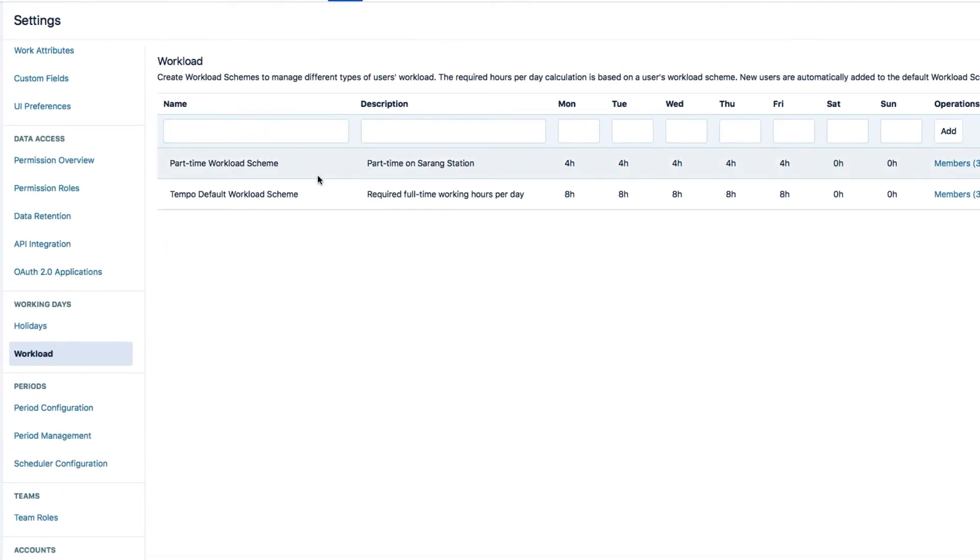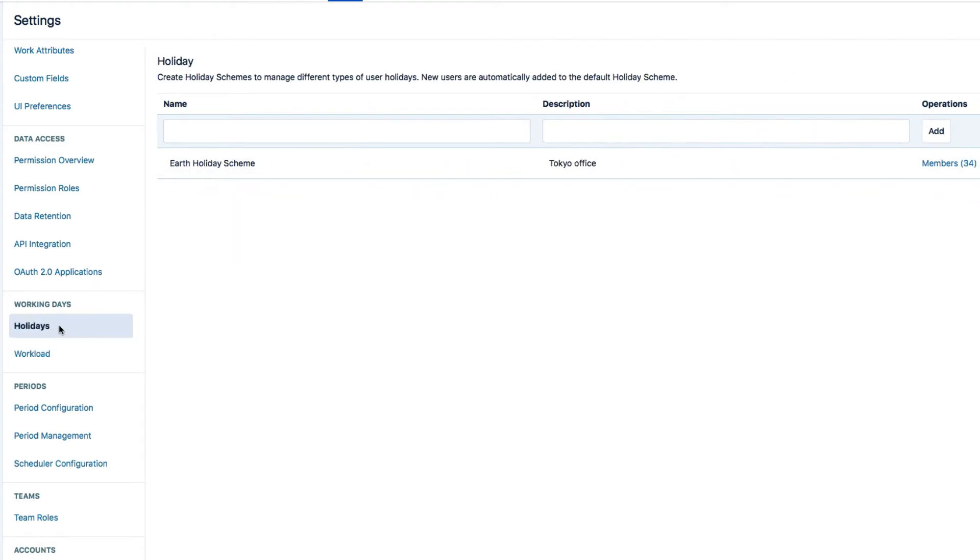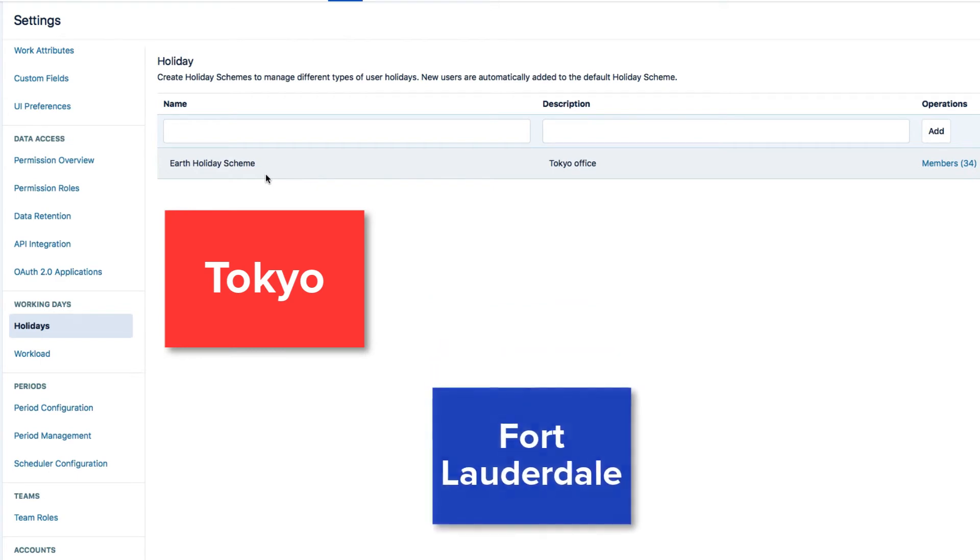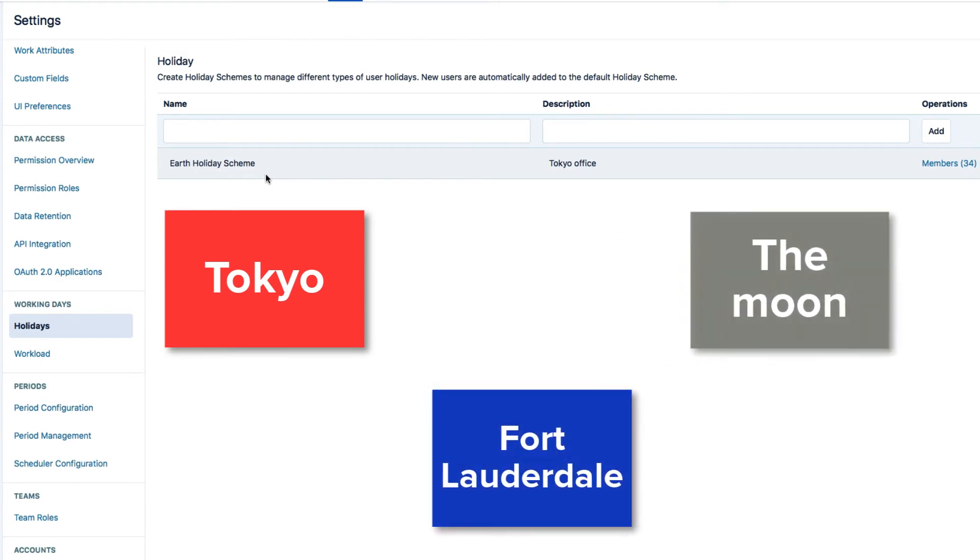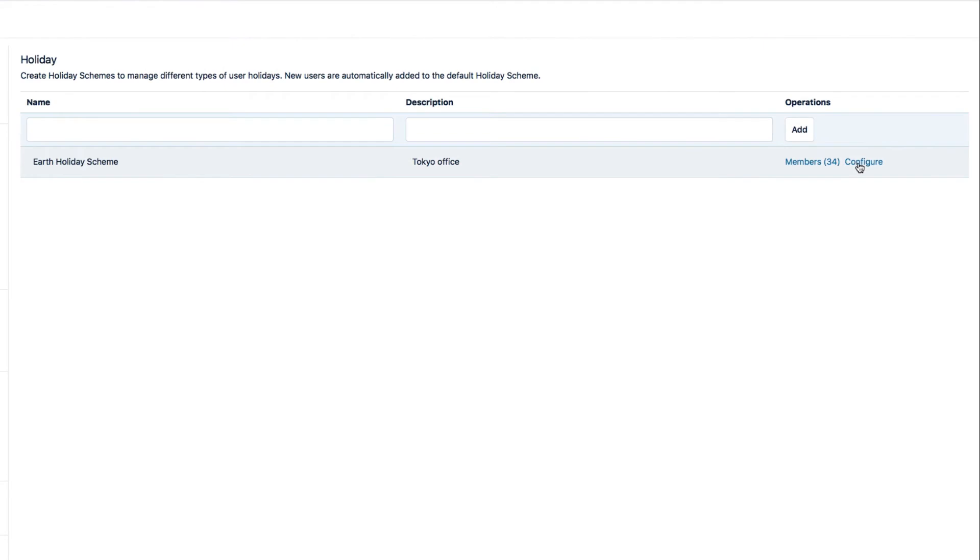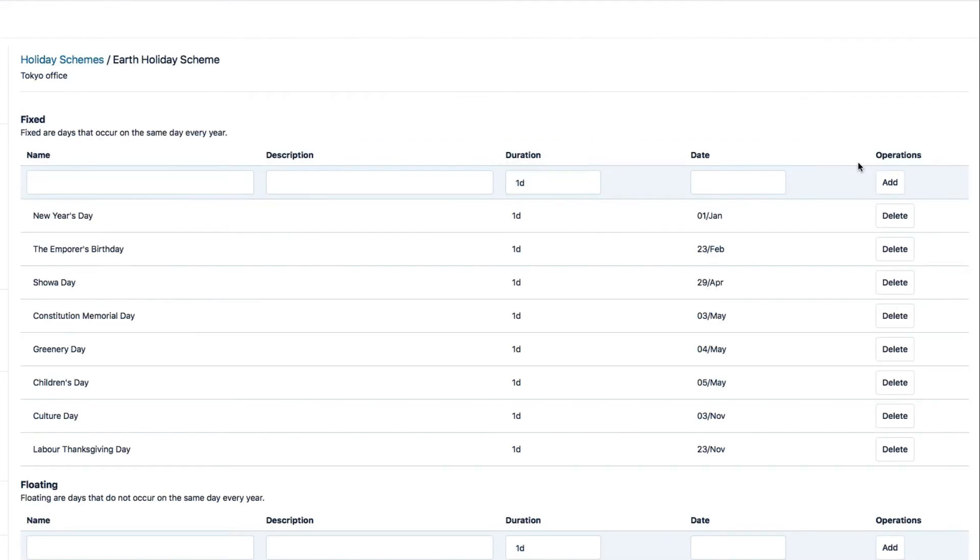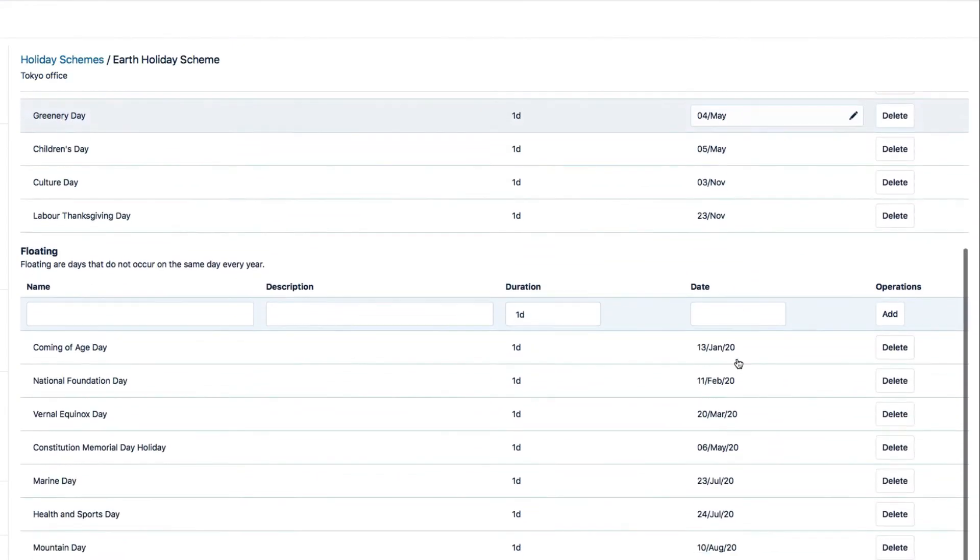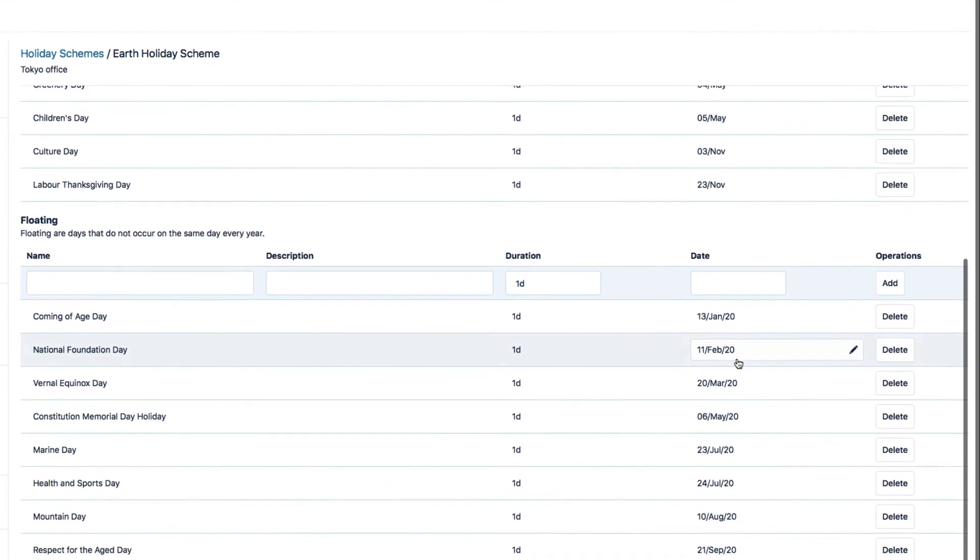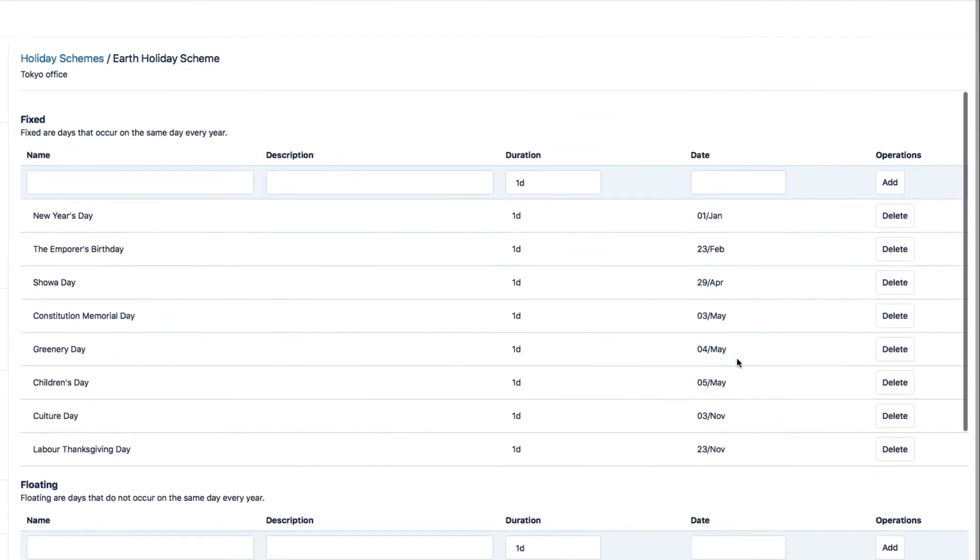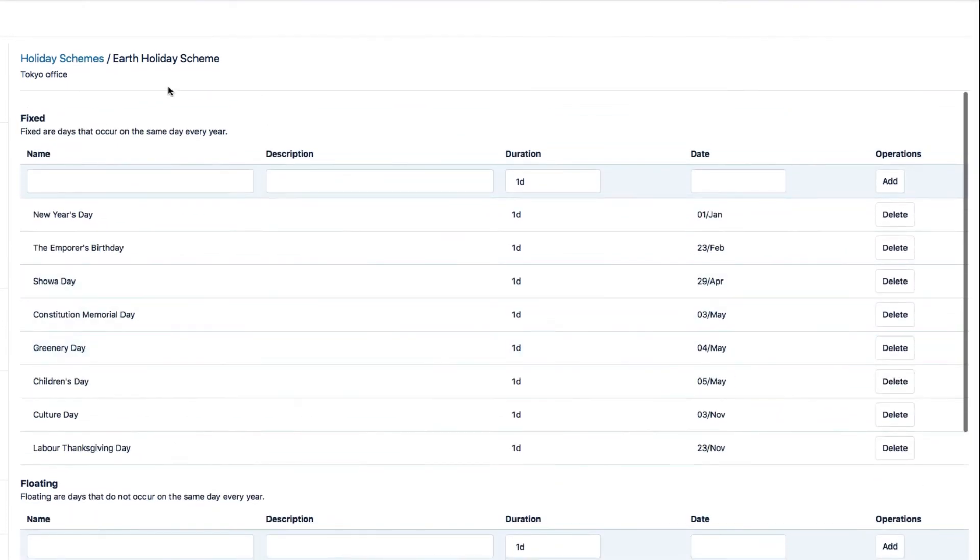With the Workload Schemes done, I need to move on to Holiday Schemes. Just above Workload here. These schemes define the public or statutory holidays for each country. And every one is different. So if your company has offices in different locations, you'll need to create a holiday scheme for each one. Here's the one that I created for Lunar Industries' head office on Earth, in Japan. You can think of holiday schemes as the opposite of workload schemes. They define the days where there is no work required.